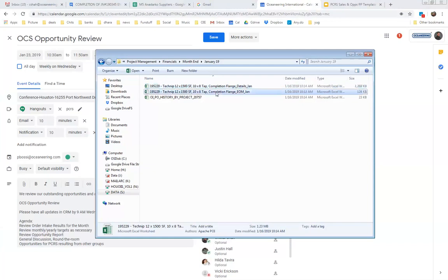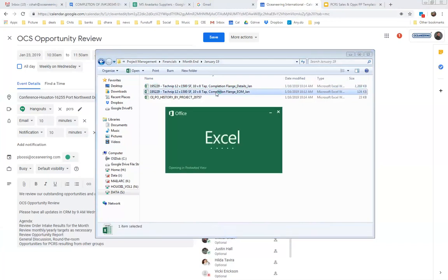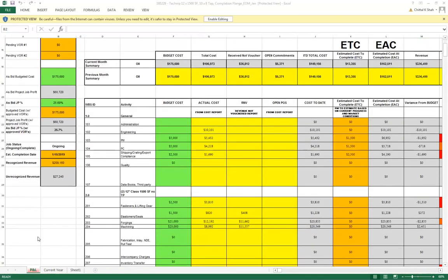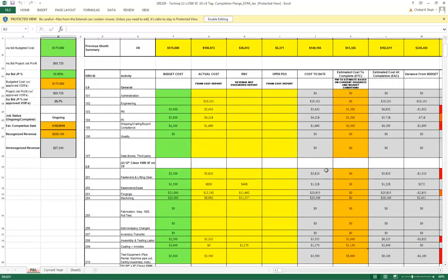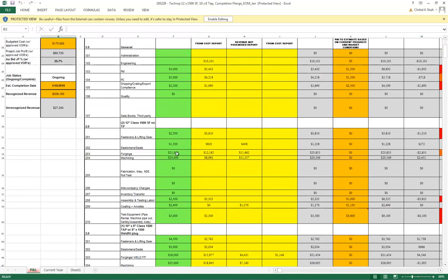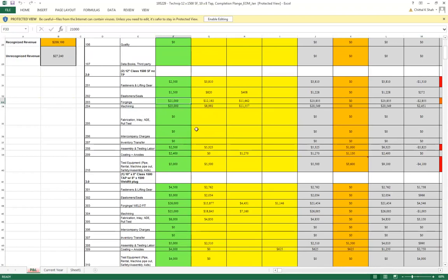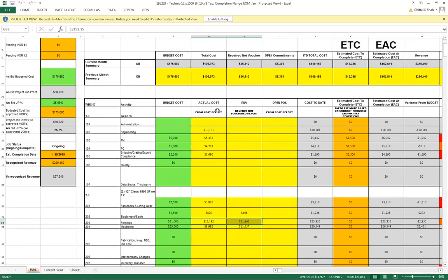The information of that file is summarized in here, where that $23,000 or whatever you were seeing before is put as a summary. So that was your budget, and that's what you spent: $23,855 for that forging plan item. As PM, you don't want to go into details every time, but you want to see overall between those buckets, my WBS, I had so much budget, where am I, and how much more am I going to need. You can play with it.